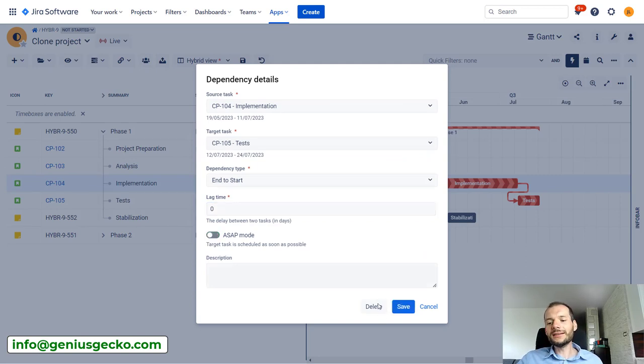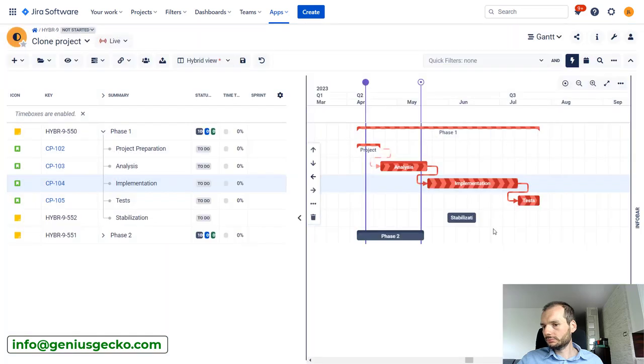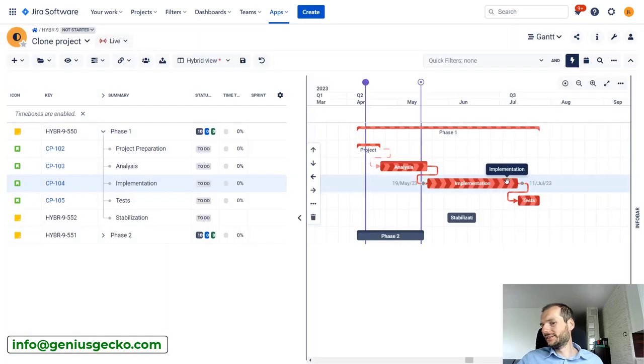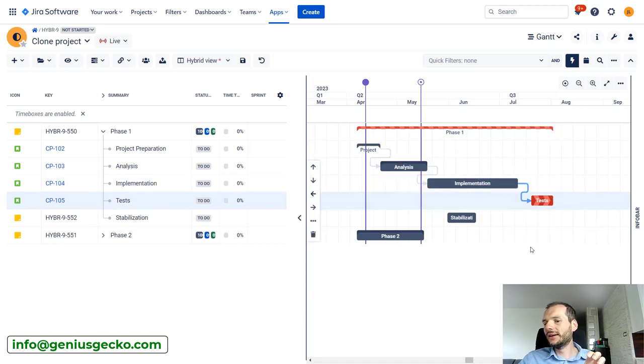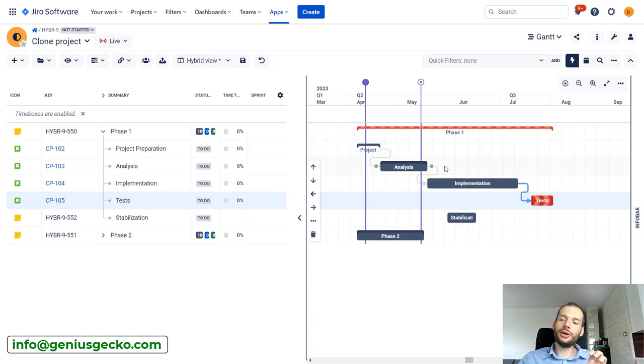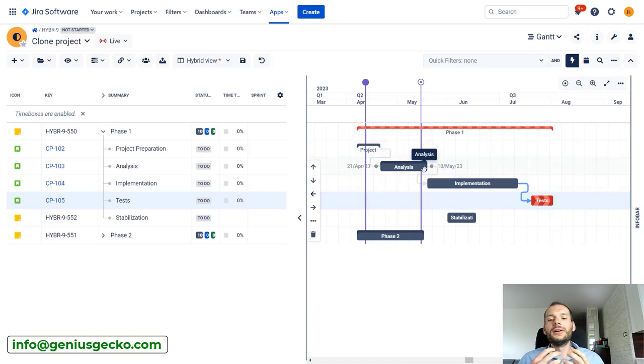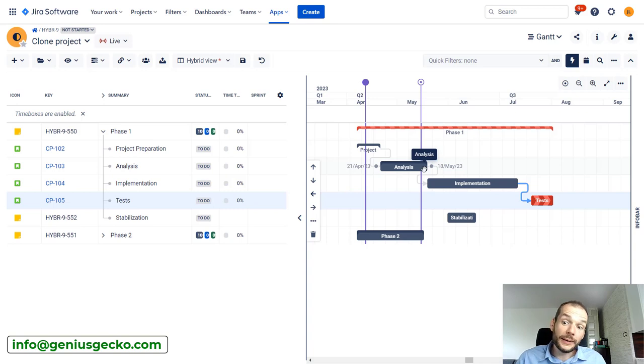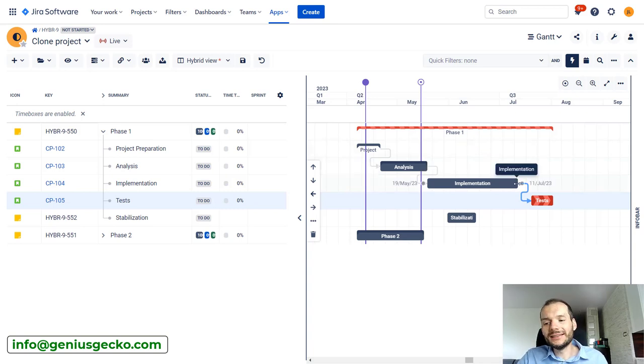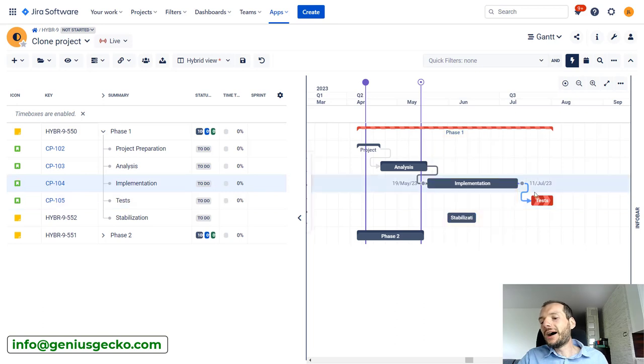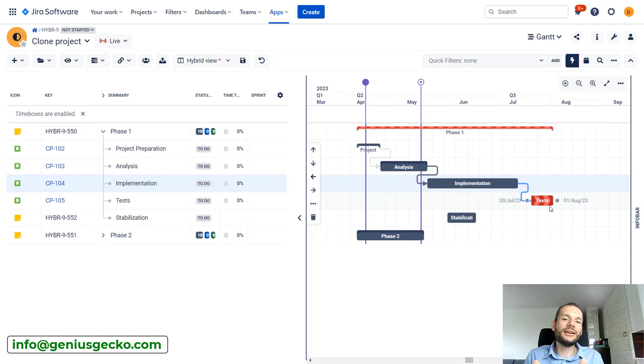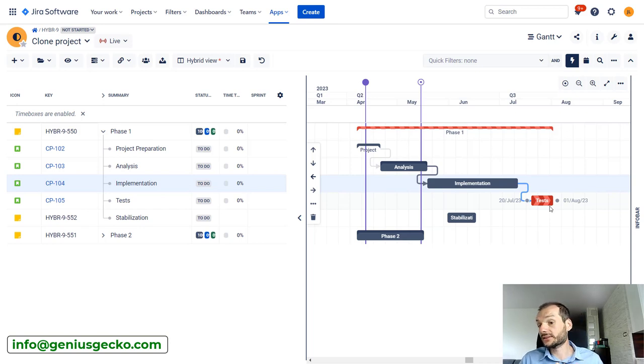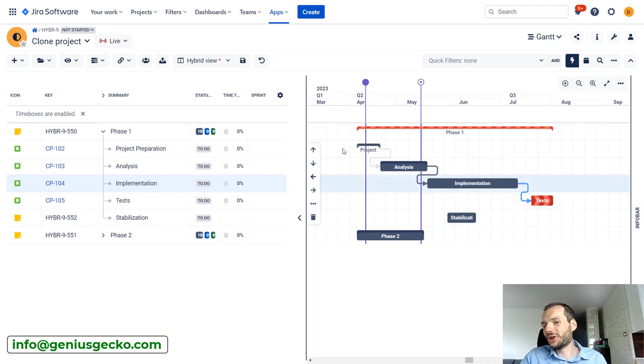If I deselect the ASAP mode, this task is still on critical path. But now I will create the gap between those two tasks, so I will just move the last one. And suddenly all three previous tasks are no longer on critical path. Why? Well, because now we can still have some delay over here without moving the end date of the last task on the timeline. Like there is some buffer between the tasks.